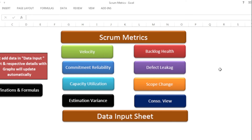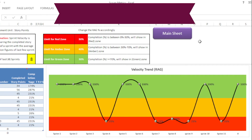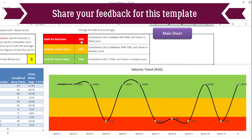Once you are done with data insertion, let's go back to the main sheet and see how the metrics are being shown. Let's go to the first sheet which is velocity. In this sheet, sprint velocity is being calculated and shown in a graphical format. The most important part here is that this graph is shown in a RAG format — red, amber, green — because you can see on the top I have set limits for the red, amber, and green fields. Sprint velocity is calculated by comparing story completion in a particular sprint with the average of the last few sprints. We take a simple average of completed story points of the last three or four sprints as a benchmark.